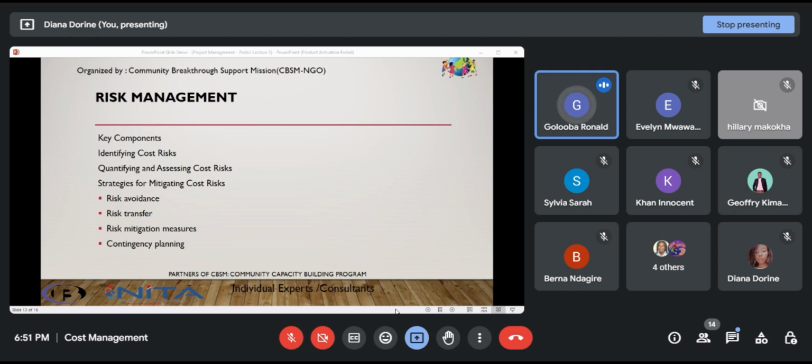So we identified that as a risk, and we had to have controls in place, which included follow-up calls to these clients to ascertain which type of service they actually received at the health center. So it depends on what project you're implementing, but you should have these implementation control measures in place.